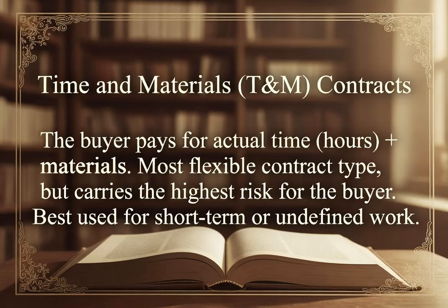Finally, we have time and materials, T&M contracts. In this approach, the buyer pays for the actual time spent, hours, plus the cost of materials. This is the most flexible type, but carries the highest risk for the buyer. It is best used for short-term or undefined work.